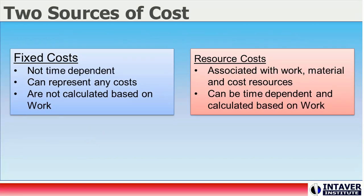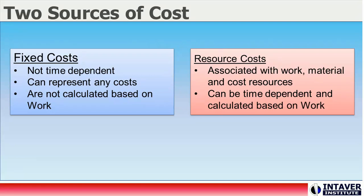In Risky Project, costs can be divided into two main categories. Fixed costs can be used to represent any costs that are not time-related due to resource allocation — typically costs not related to specific resources. Resource costs are based on the hourly rates or costs for use of resources assigned to activities, and can be used to calculate time-dependent costs using resource rates. Cost type resources are a special case, acting as a hybrid method that shares characteristics of both fixed costs and resource costs.